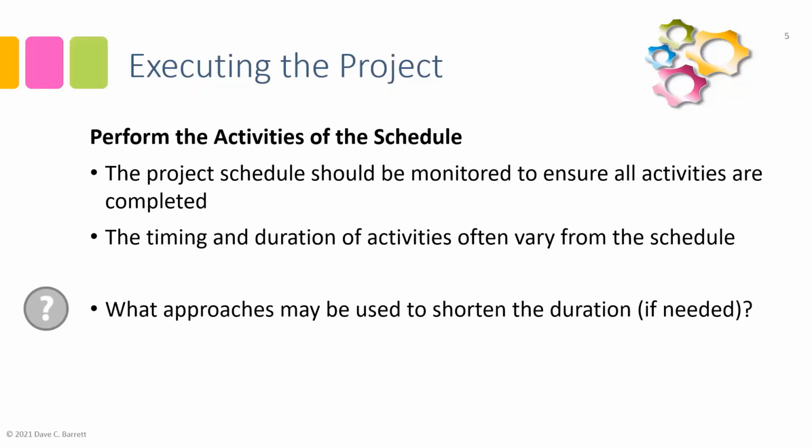There are various approaches that may be used to shorten the duration of the remaining work and therefore to maintain schedule. This is a constant thing that project teams do. And I would direct you to chapter 11 of the textbook, which describes various approaches. Just as an overview, there are a number of approaches. One is process improvement. Oftentimes when confronted with challenges, teams will, just by improving the process of the remaining work, be able to maintain the schedule. Not always possible, but it's something that should be considered.